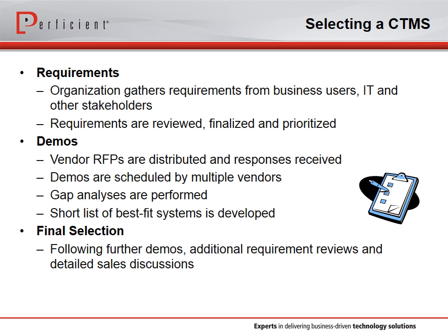Each system that you do consider should be evaluated against your prioritized list of requirements to ensure objective decision making. After you look at each demo, look at the requirements the system did not meet and determine how critical these gaps are and whether they can be addressed within your budget through some sort of configurations, customizations, or workarounds.